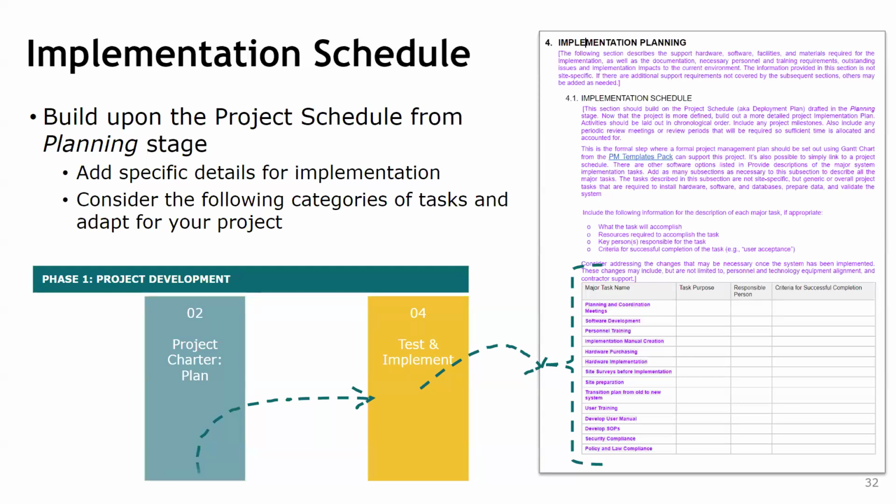Or, I've worked on another project in the past for blood safety, where we needed specialized printers to print the donor numbers. So again, you need to plan for those in advance to make sure that they are purchased, and then put the schedule in place. Again, things for user training, develop user manuals. Obviously, you need to develop user manuals even way before the training.